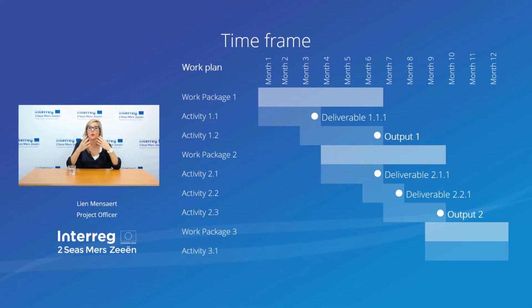Meaning that you will have to incorporate a bit of time in order to close all of your activities. And therefore, we advise you to advance some of the outputs and not to put them completely at the end, because we all know that some delays might incur, which might endanger you then to deliver the outputs before your project comes to an end.